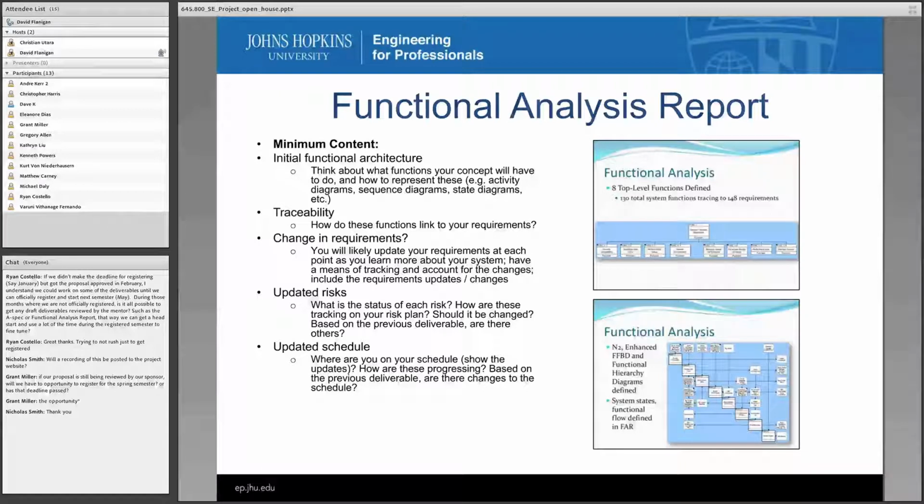The intent here is to run this like a system engineering project. So you're always updating your schedule. You set the schedule, so now you're just going to update it. You've set the risks. Now look at how you're mitigating those. Some of them might not have any work or status in that one deliverable, but maybe the next one. The goal is not to drive all of these down to the green box in the risk cube, because you're not building anything. We walk you up to about the A-spec part. So think about some of the risks as you go along.